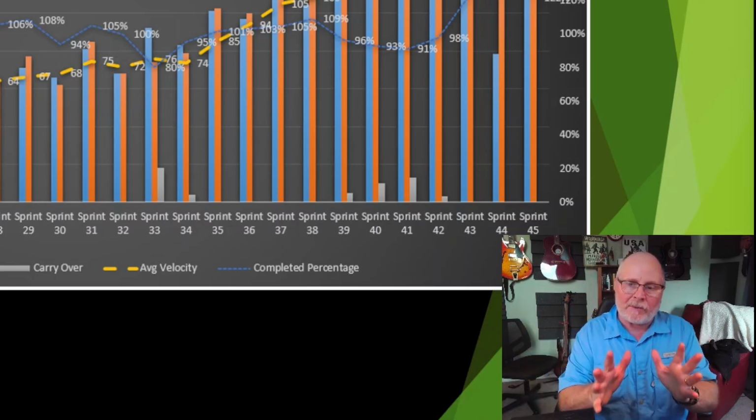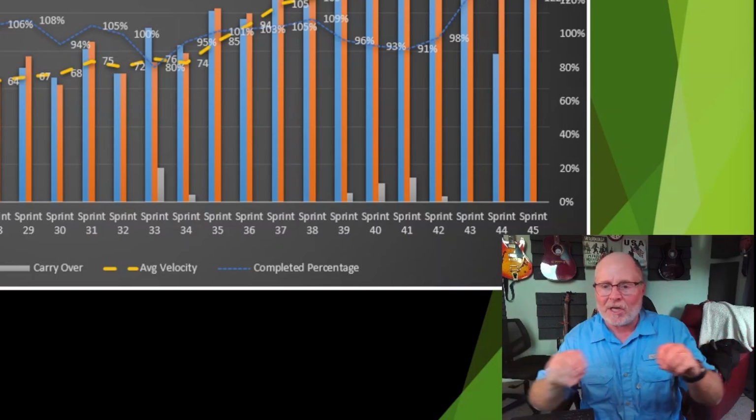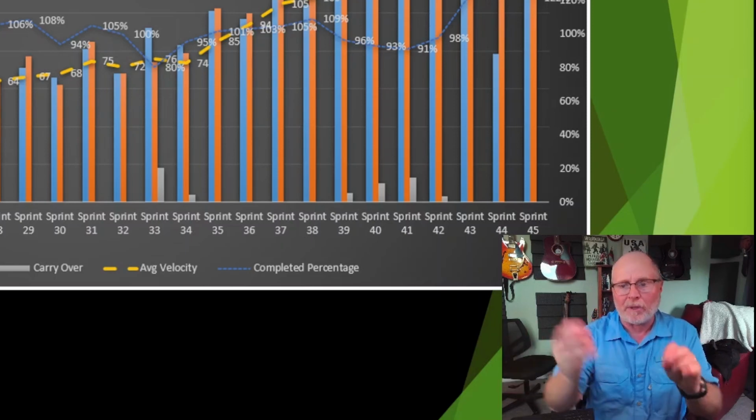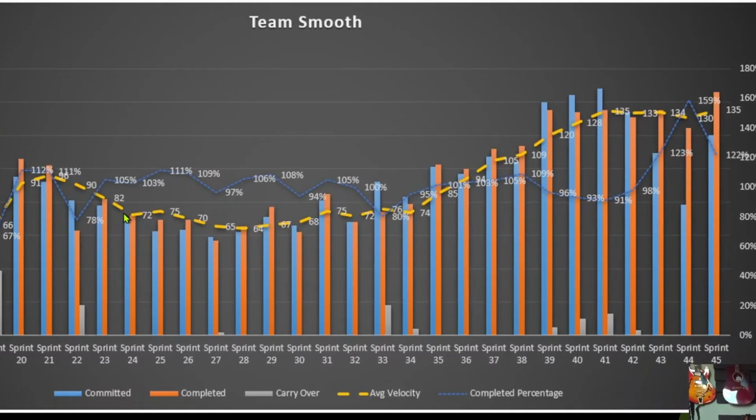I put some governance around it and ran into another problem. Now you had to coordinate across the teams. Any changes you had to make needed to be planned and brought to those teams and put into their backlog. So you'll notice that the velocity drops a little bit as they begin to learn how to coordinate across the teams. They stabilize.